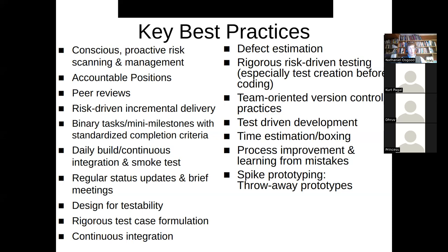So Dan comments, evaluating risks as development of the project proceeds. What has changed as the project goes on? That's right. And I'm looking for two things here for risk management. Number one, for risk scanning, identifying new risks and identifying cases where previously identified risks are materializing.